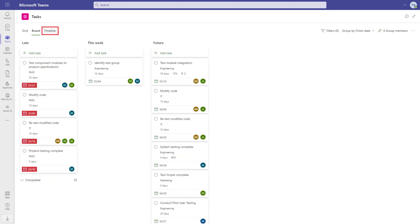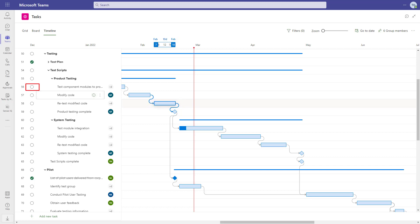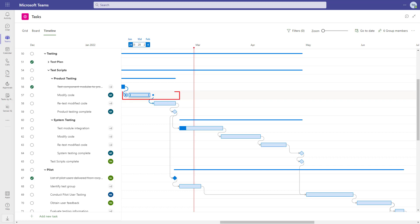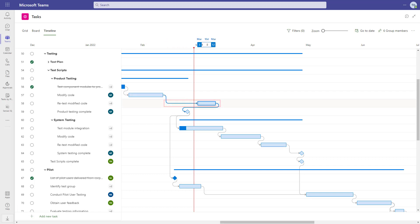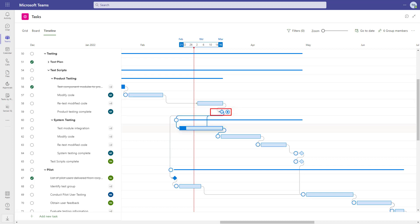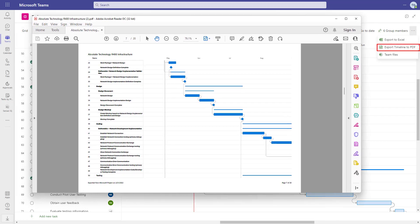The timeline is great for a more visual view of the project. When we mouse over a task, it highlights the dates at the top. Marking a task complete here gives us that very satisfying ding. We can interact with the task bars, like extending them to increase the duration of a task, move a task by dragging it, or create dependencies between tasks. The timeline can also be exported to a PDF file.